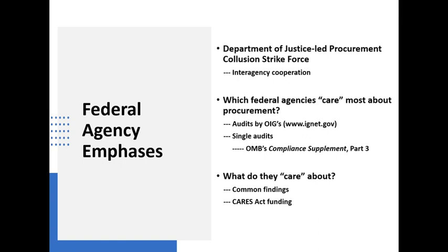Okay, we have a couple of more questions. Somebody wants to know if working with a contractor to try to determine the budget for a project prohibits that contractor from bidding on the project. I don't think that working on the budget for it does. The way the term is used in the regulations is it says if the contractor is involved in preparing the solicitation. Now, preparing the solicitation is preparing the invitation for bids or the request for proposals.